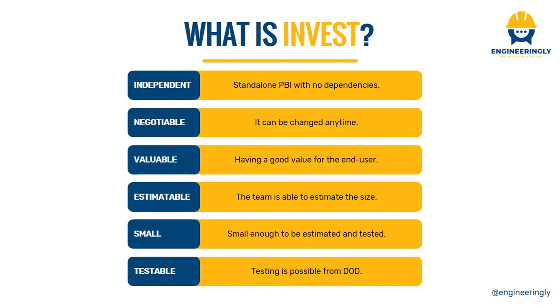Next thing is, it should be valuable. The specific user story should bring some ease to the end user or add some value to the customer or whoever is funding the project. It should be estimatable. We should know how long it will take and how much it will take for the user story to be completed.